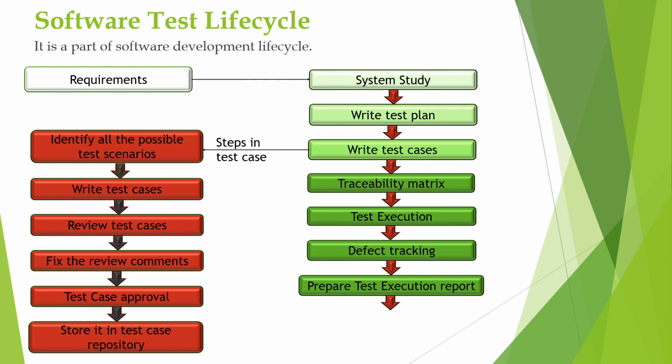Once the project is handed over to the customer, the test lead or the test manager will call all the team members and hold a meeting. This meeting is called a retrospective meeting or post-mortem meeting. In this meeting, they will discuss all the good things that they have done and the achievements, all the bad things that they have done, and the problems or challenges that they have faced, and how they overcame them.